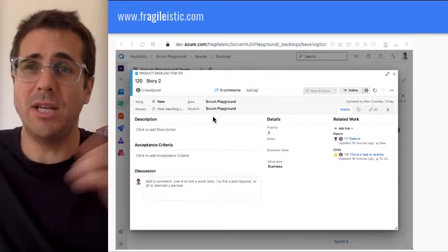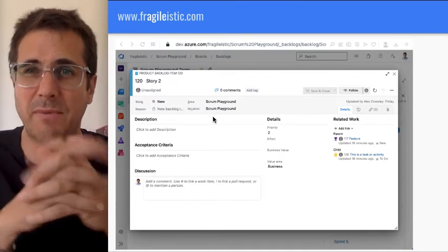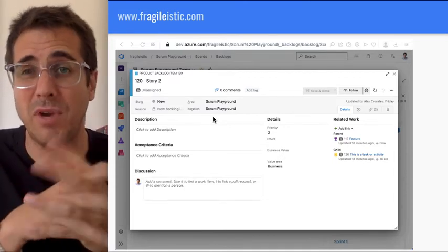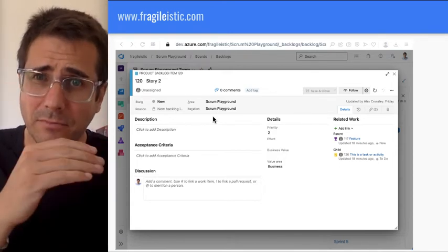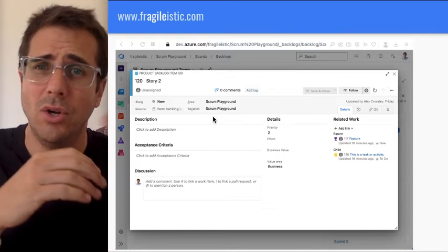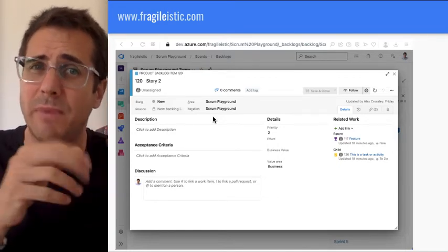So what you're doing really is you're doing that and then you're going to go on and groom the backlog. So you do that for a limited time slot, maybe 45 minutes. Don't take it too long. This can be really, really brain intensive work. So 45 minutes is good. And then once you've got your cards all nicely refined, it's probably a good idea just to go and see where they sit in the backlog because things might have changed.